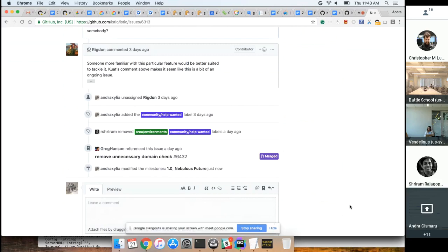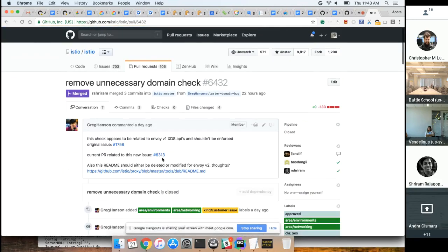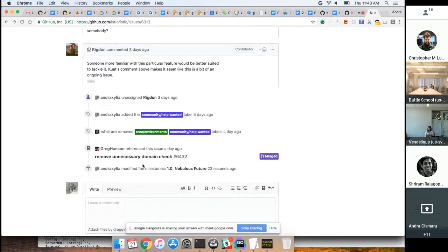Okay. Taking that further, should that be the criteria for almost any P0? I think the majority of stuff we want to be in beta for the GA release. So does that mean that for a feature to be considered, we need to block that on proper end-to-ends for each of those features? So we have the test criteria, right? Mark features through the different stages, alpha, beta, and GA. There's even an issue template for features that has the list of requirements.